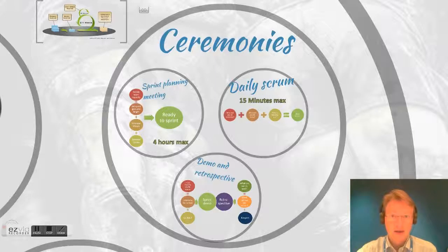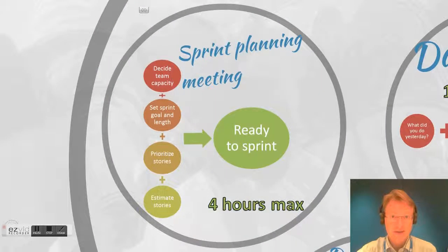The first one is the sprint planning meeting. You have this before the sprint starts. Normally, you say that it should last for not more than 4 hours. There has been some discussion saying 1 week could have 1 hour, a 2 week could have 2, and so on. But basically the principle is not more time than people can focus. And usually 4 hours is the maximum amount of time that people can focus. After that, people fall asleep.